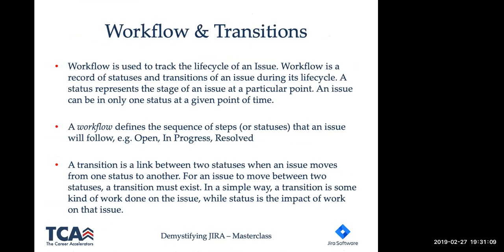complete. So for example, an issue could start off as an open issue, which means that it has just been created and needs to be assigned to somebody. Now, once it's assigned, it will then move from open to in progress, which means someone is actually working on this issue at the moment. Now, from in progress, once the person finishes the work on that particular issue, the status changes to resolved.